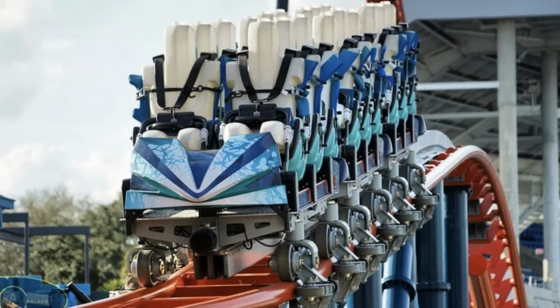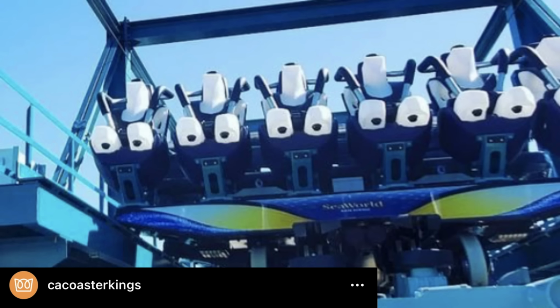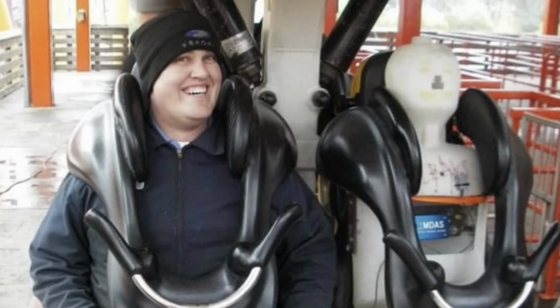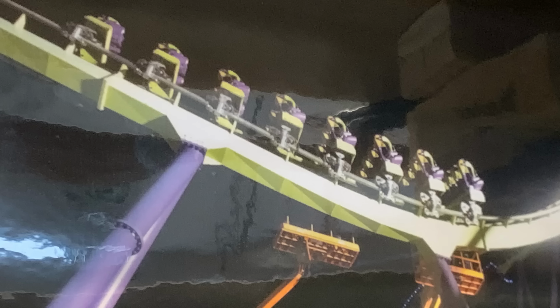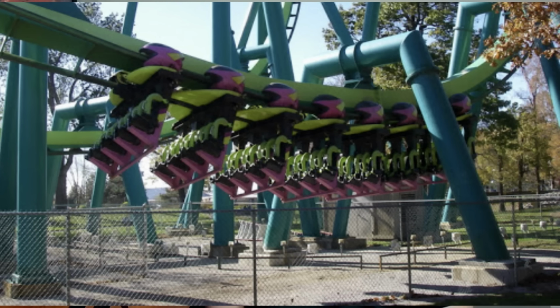Once all the QC is done and everything's good, that's when you load the train up with water dummies. Again, trains typically, with all the new bushings put inside, everything is nice and tight. The bearings are nice and tight. Everything is very tight. Trains don't like tight. They like loose. They like warm and loose because they fly around the track when they're warm and loose. So when it's cold and tight, trains don't like that. So we add water dummies because we're adding as much weight as possible to the train to actually make it around that circuit the first time through. If you put it together too tight, it'll valley and it won't come back. That is no fun at all. Nobody wants to do that.